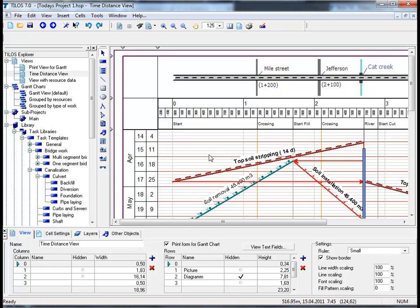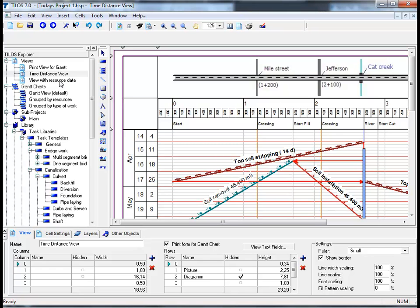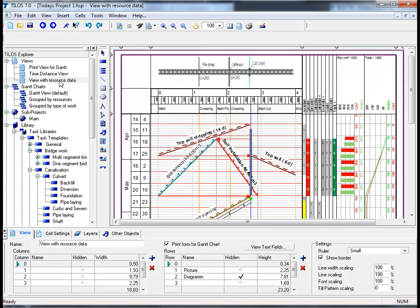Resource data can be displayed as a diagram or diagrams along the time or the distance axis. Inside our sample project on the left-hand side in the Tylos Explorer, there is another view defined which contains resource data. By double-clicking on this view, we can see that the distance scale on the main time distance view has changed in order to show the diagrams on the right-hand side.